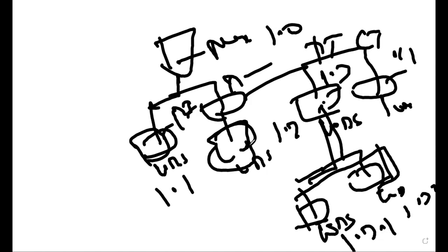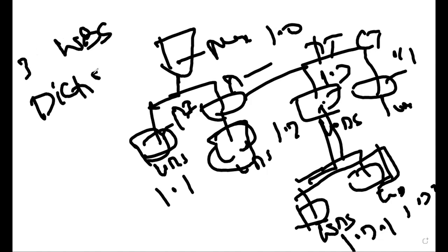There should be a document, right? Please note the third document, which is associated with the scope baseline, is called the WBS dictionary. The WBS dictionary is a technical document that gives the complete information about each and every WBS component in the same hierarchical structure.